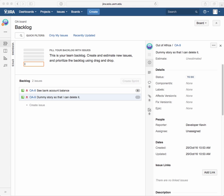The other thing I wanted to point out is that in this backlog that we have here, we're starting to see all these issues. These are at this point all stories. The ones that have an estimate over here where we have this gray little rounded thingy, you can see I had put in an estimate of eight and that's where it is right there. Whereas the dummy story so that I can delete it doesn't have any estimate at all.